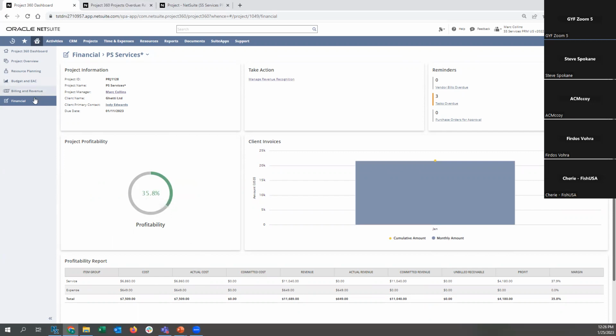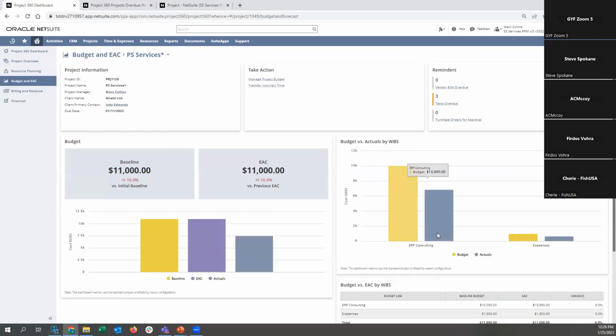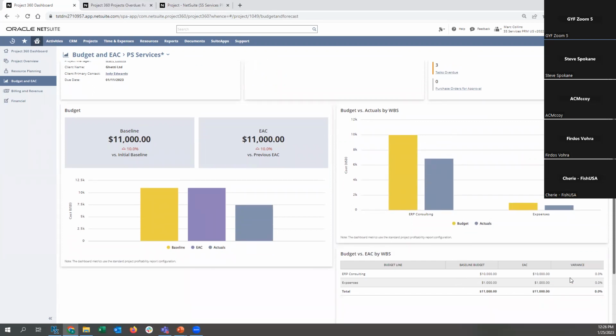Okay. I guess also, whenever you do open these up and you're looking at your estimate at completion and your WBS, it will give you anything that's unmatched. And you can look into that, open it up and see the actual transaction. So maybe you saw an invoice that wasn't expected, or maybe a purchase order, some extra expense that wasn't expected. Now you can take that information and add it to your EAC to increase it, or make it more accurately reflect what you're expecting.